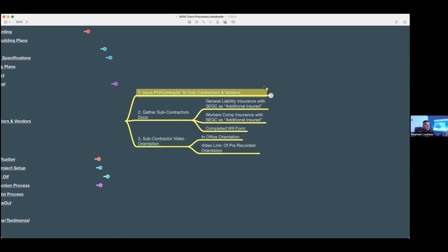And then send us a photograph, a high-res photograph. Let us see that. Show us an overview video and make sure that we're good. And we do that oftentimes without even having to go to the job site. But that was a $1,000 issue waiting to happen. The other one was a $1,000 issue waiting to happen that we solved today. And actually, it's more than that because it compounds. It involves multiple trades and rework and delays. You see what I'm saying?